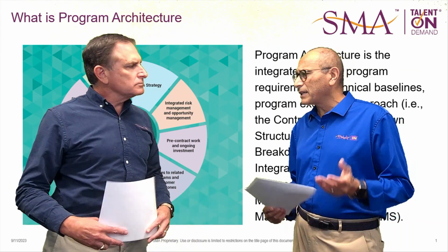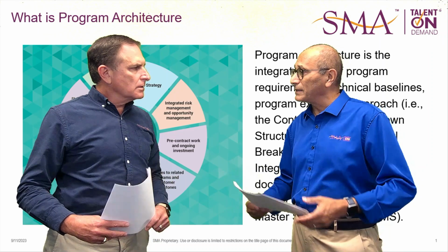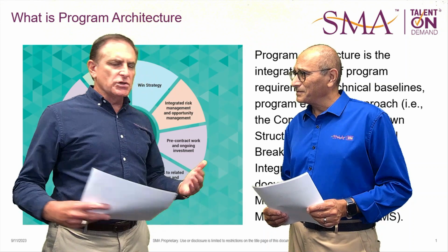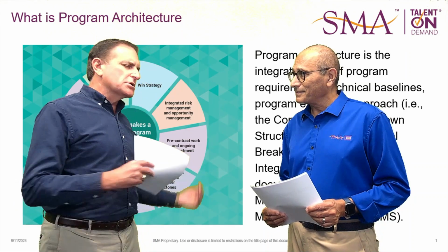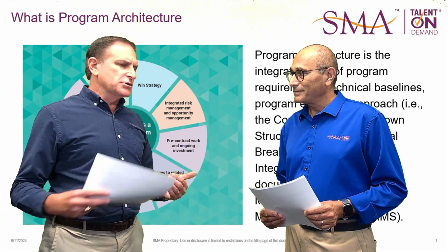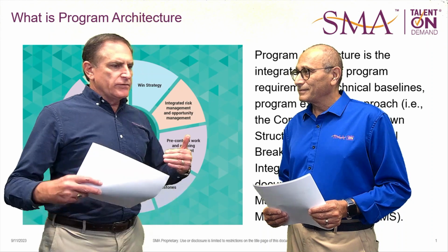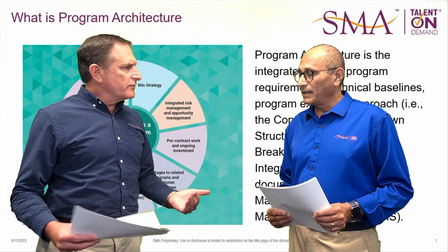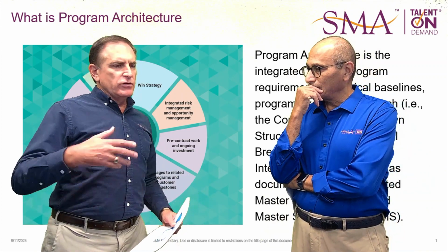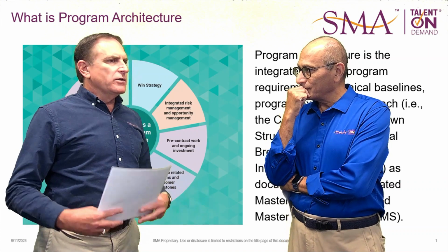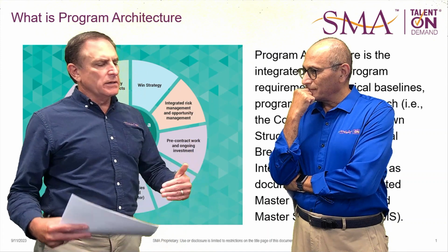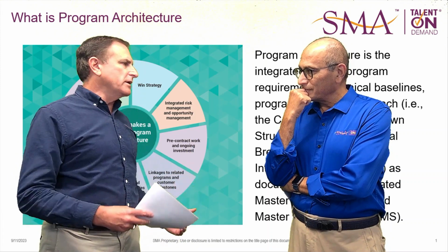Now, how do DoD customers think about it? What do they use it for? So it's really used to a couple of things. When you start thinking about program architecture, one of the first things we do, very much like on a proposal, is we actually burst the RFP. In the case of program architecture, what we're really interested in is the technical section of the RFP itself, the performance work statements or the statement of work, and we burst that to determine what are all the requirements. And what this allows us to do is then start aligning the requirements to the win themes, allowing us to identify aligning the requirements to risk and risk mitigation activities.